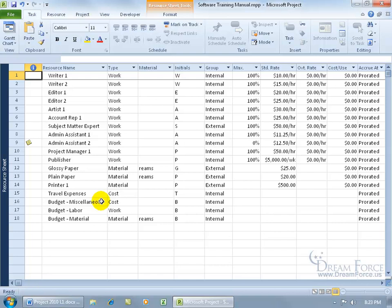When you start actually accruing your travel expenses during the project — say one day you're at $1,200 and then the next at $1,300 — as long as you're at or under $2,000, you're fine. But if you go over any one of these budget resources, project's not going to do anything, because the whole purpose of budget in project is for comparison purposes only. You can compare what you set aside for your budget versus your actual cost and say, wow, we're at $1,900 already and we still have a lot more travel expenses coming up. I guess we better call somebody and get more funding.